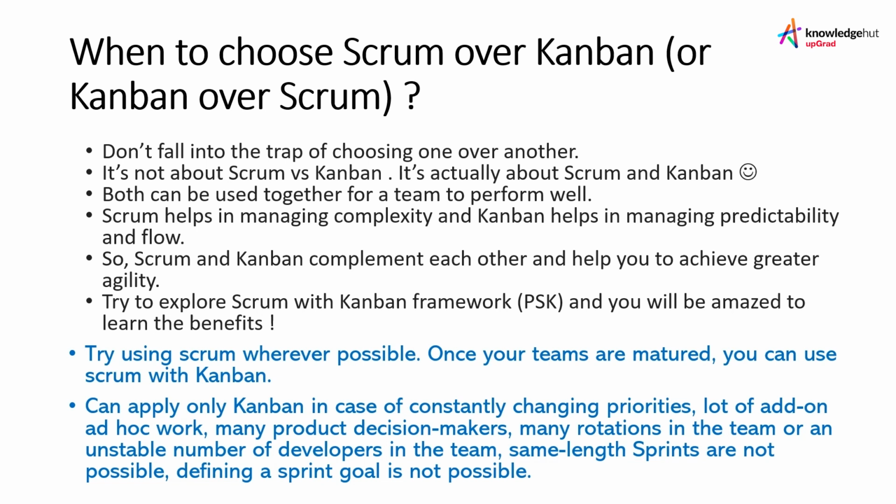So now you can try to make use of these added metrics when you are using the Scrum framework, and you also use the WIP or work item age in Kanban. So when you are doing your daily Scrum, your team can get into a discussion: hey, why are certain work items getting aged a lot beyond normal, and what should we be doing about it? So you will start seeing those kinds of benefits.